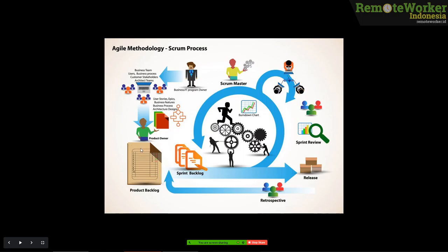Now, the great thing about a sprint is if there are tasks that are chosen for a week, there must be no other task inserted into that sprint, except if it is a bug. For example, without Scrum, the team says, hey, let's pick this task, okay? And then after 2 days, I think that task is better, okay, let's do that. No, that is not the way to do Scrum, because if you do that, you will not get a result at the end of the week. Everyone is working as fast as they could, and at the end of the week, they will release software for that.